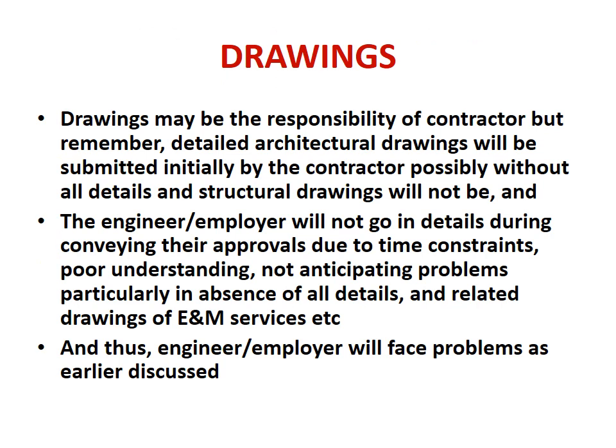Let us talk about the drawings. The drawings may be the responsibility of the contractor, the EPC contractor, but remember, detailed architectural drawings will be submitted initially by the contractor, possibly without all details, and structural designs will not be there at that time because detailed architectural drawings have not been finalized. Structural designs will be prepared later, maybe during execution of work.